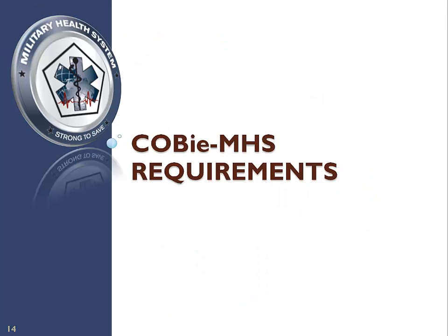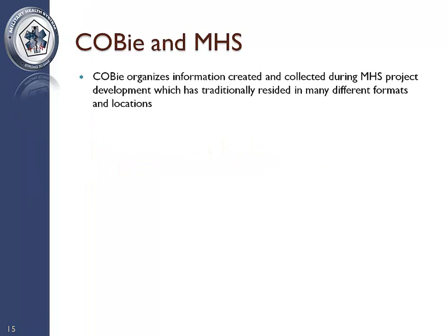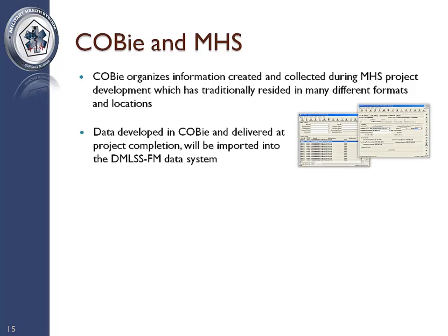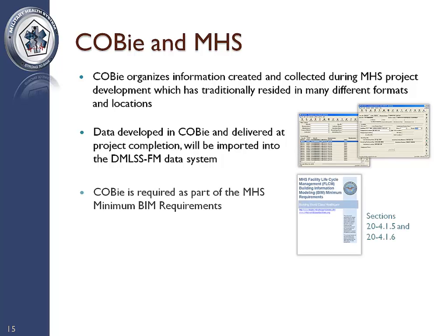We will now review how COBie will assist MHS project development. COBie organizes information created and collected during MHS project development, which has traditionally resided in many different formats and locations. Data developed in COBie and delivered at project completion will be imported into the MHS's Facilities Management Data System, DIMLS-FM. COBie is required as part of the MHS Minimum BIM Requirements.